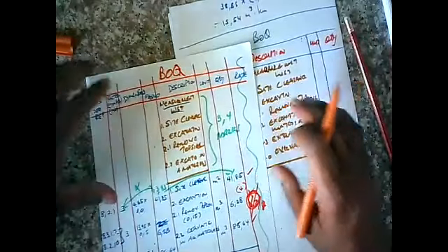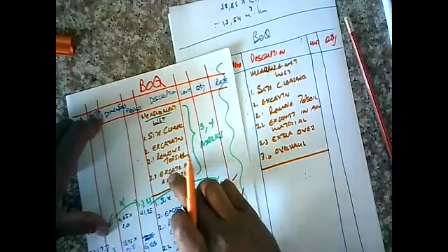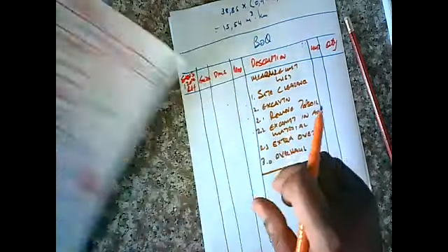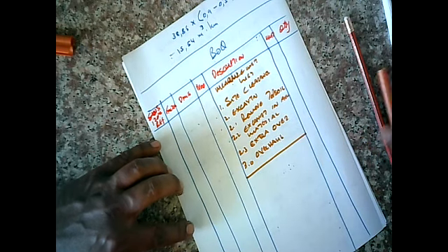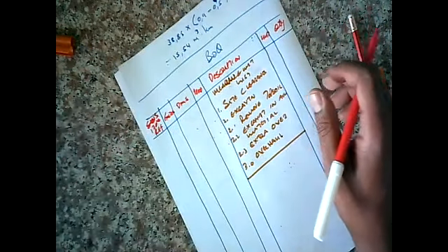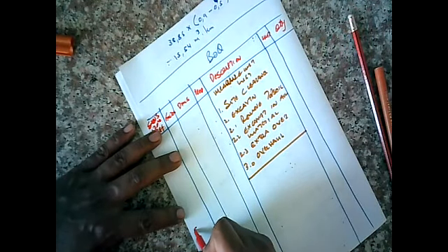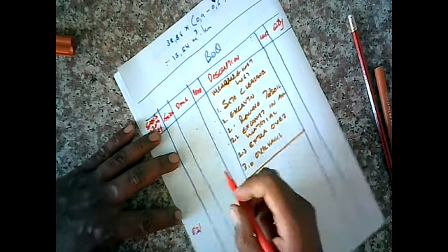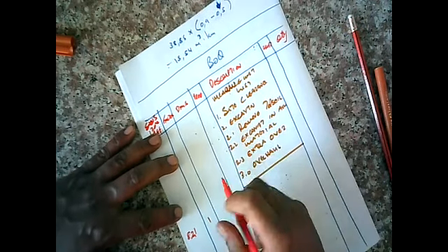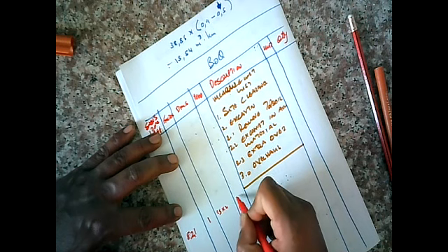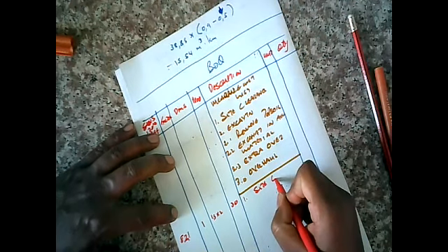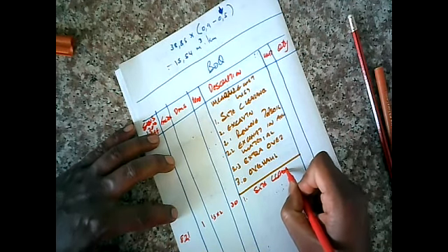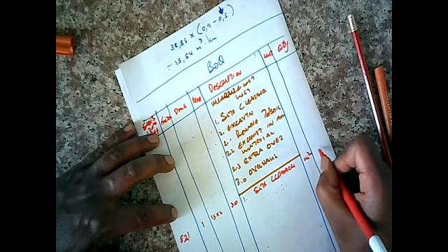All right, what's happening? Can you see how, from the previous question to now, it's starting to grow? It's starting to grow. All right, let's tabulate this. Factor here is one because there's only one of them. Your dimensions are 15 by 2, you've seen 30, and this is site clearance. And the unit is meter squared, and the quantity is 30.